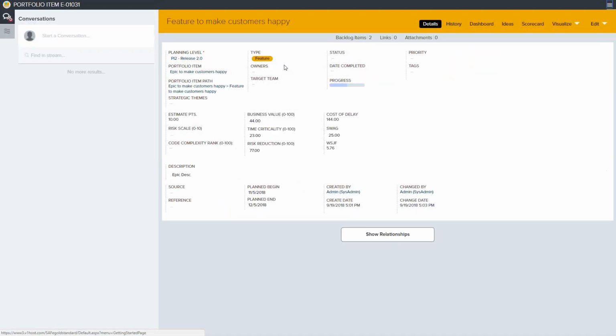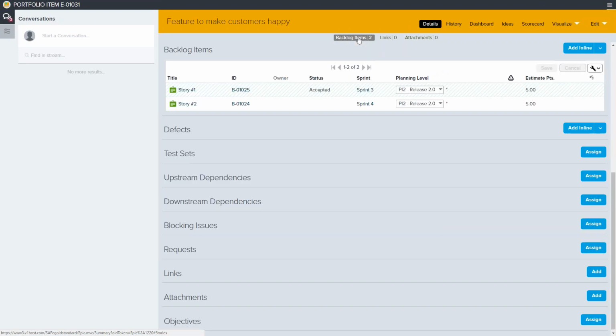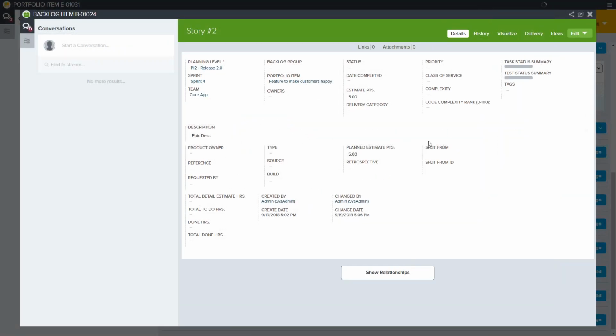The last thing I want to do is just set a dependency on that work. So if we go back into that story one more time, I want to make those 2 stories dependent on each other, which we didn't do originally. So in this case, I'm going to go into story number 2, and I'm going to make story number 1 an upstream dependency of that.